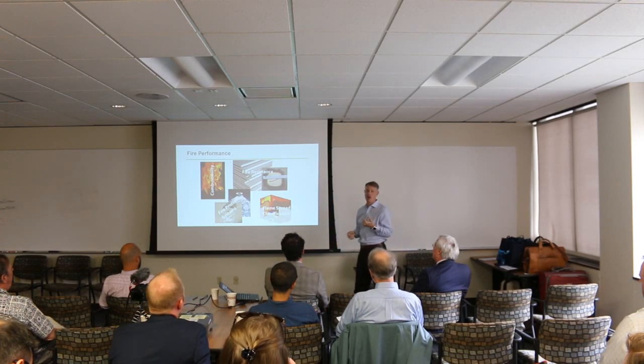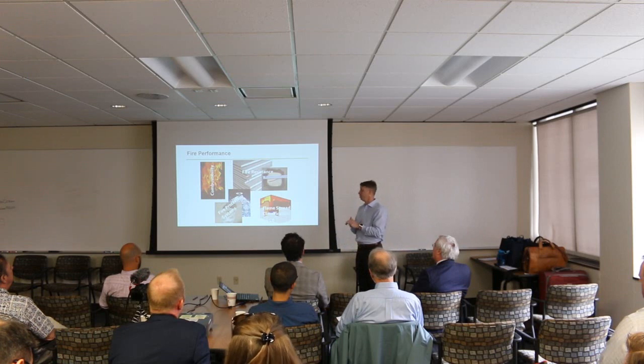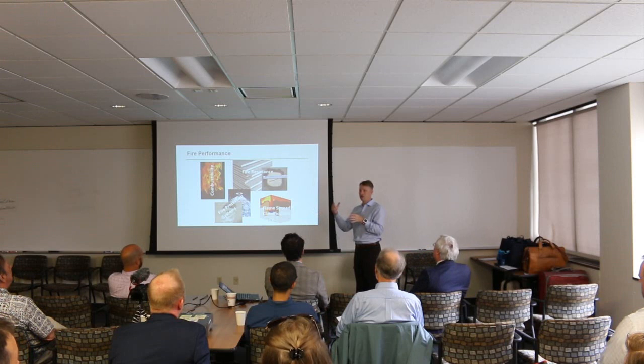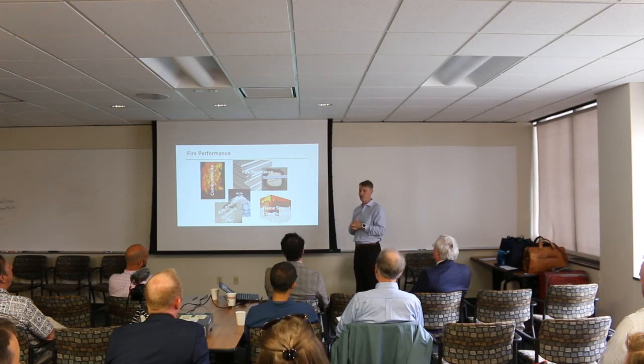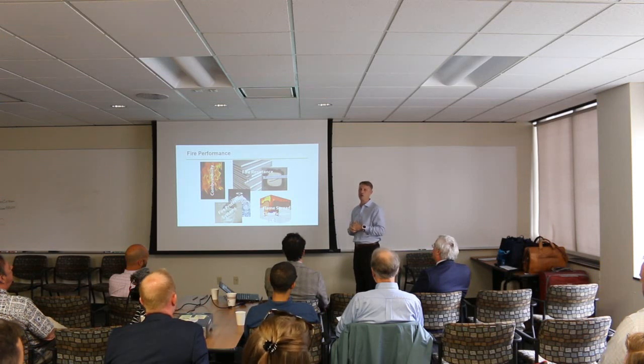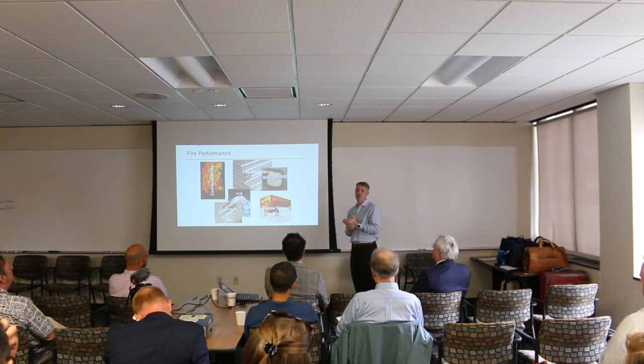Brock Commons said, our lease on the building, by the time they did the fire test and got the results, was costing them $4.5 million. Like, $4.5 million, we can buy a boatload of gypsum. So they threw 3 plies of gypsum on everything. After the fact, they've seen some of these fire tests that we've done now, and they're like, well, crud. We could have done one ply of 5/8 inch type X on the floor ceilings and probably just done 2 plies on the columns, the primary structural frame, and been good. But at the time, it was what it was.